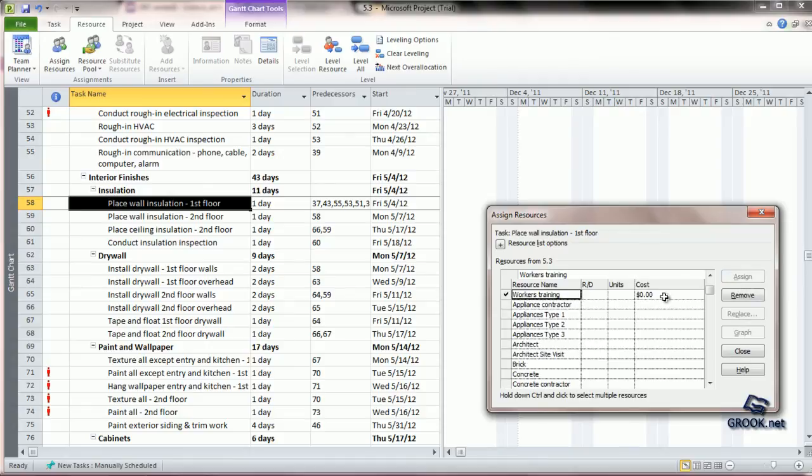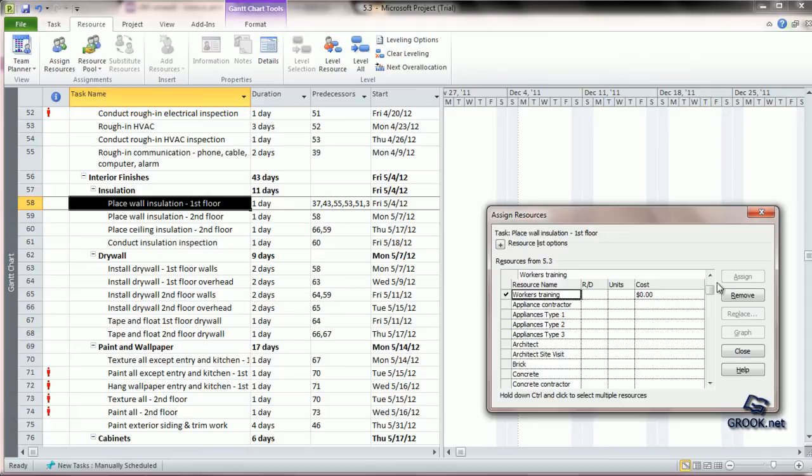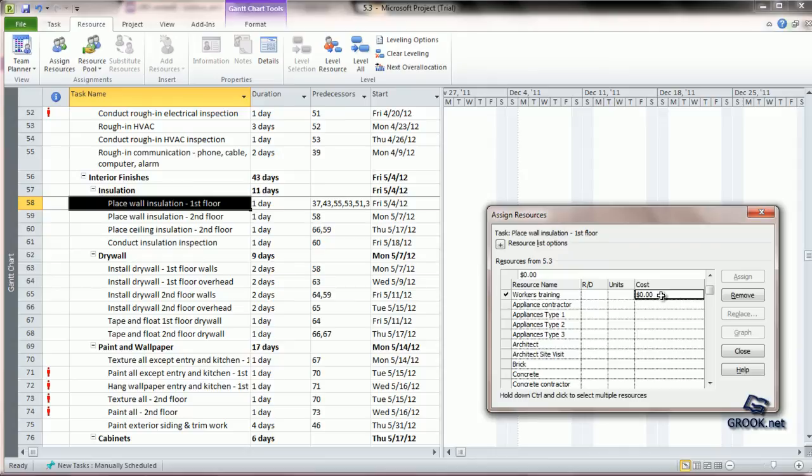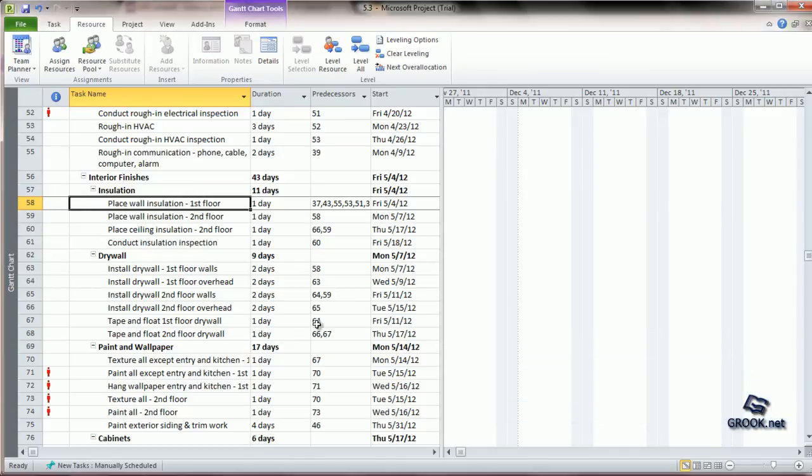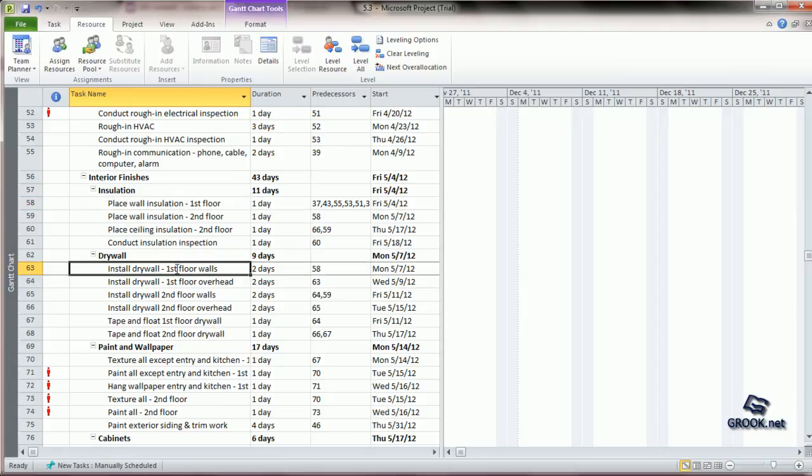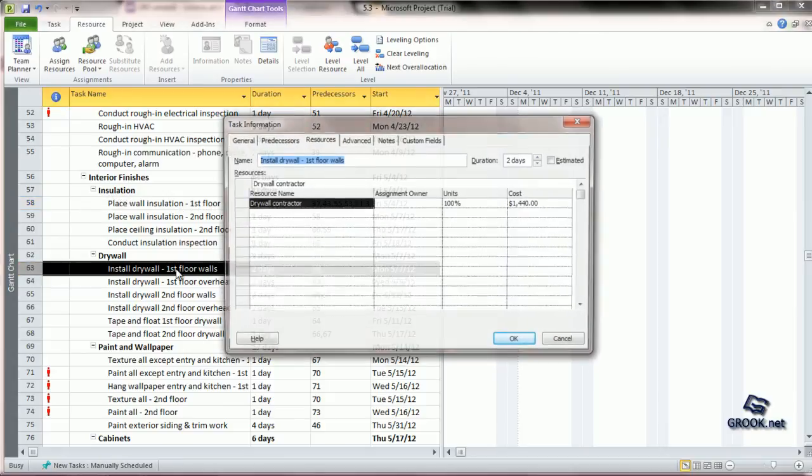We want to do a similar thing for installation of drywall also, but let us say the training costs for both these tasks are different. MS Project gives us the option for entering different costs for the same resource at different tasks. For example, here we can take this to be $100.